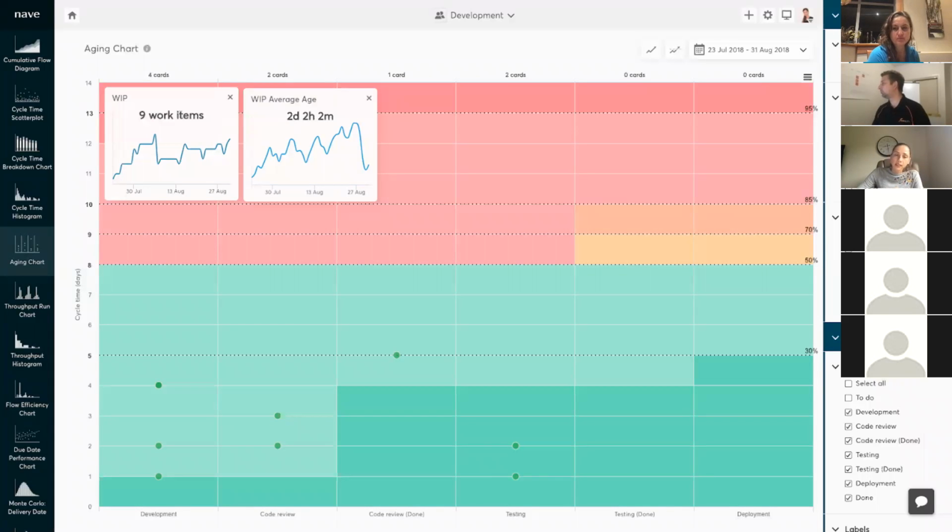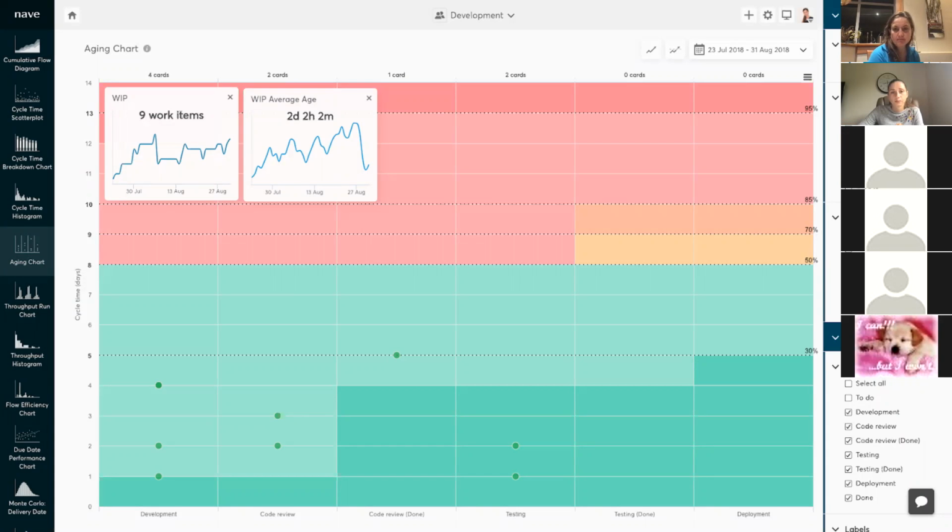By expediting a task, you're effectively suspending all of the remaining work that's currently in progress. Essentially, you borrow time that would otherwise be reserved for another task in order to fulfill your commitment. However, keep in mind that expediting work generates flow debt, so make sure that the short-term benefits are worth it in the long run. The aging chart allows you to change your basis date to see how your process looked on a certain day in the past. It's very useful during retrospectives to see how your tasks were aging back then.